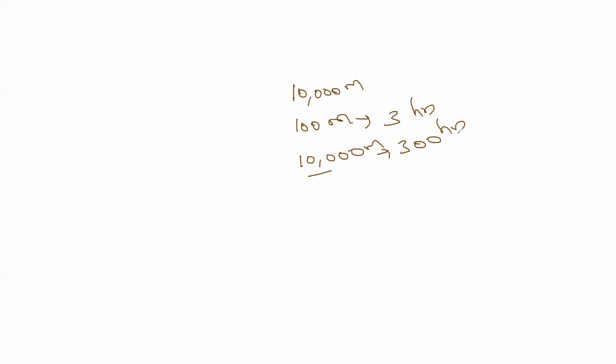That is parametric estimation. However, in some locations, when they are digging to lay the cable, there could be some obstacles. They have to remove those obstacles and then lay the cable. It can take more than 3 hours for that 100-meter stretch. So if I put exactly 300 hours, when the team hits an obstacle, there will be panic. Oh, we have to remove the obstacles, then lay the cable. We only had time to lay the cable. This is going to delay our work. That will impact our commitment, our bonus, etc.